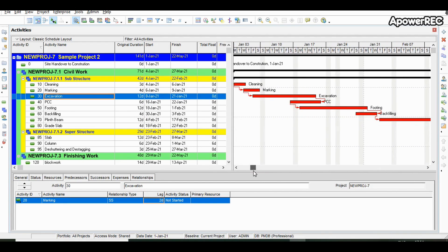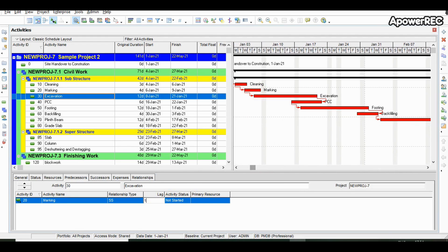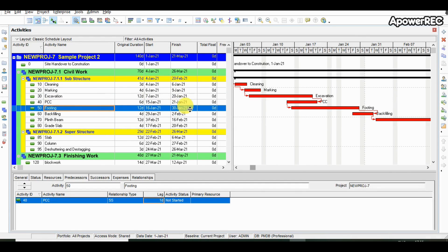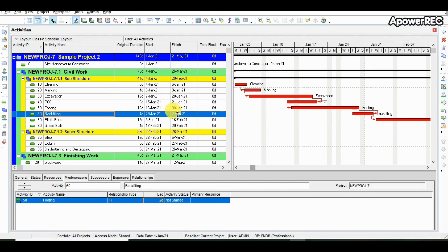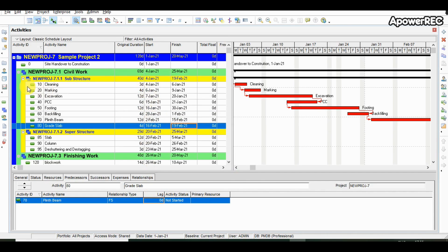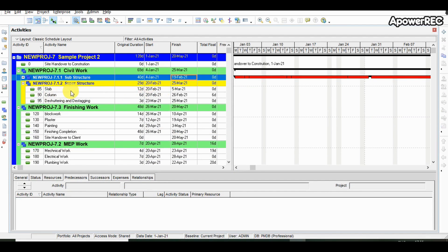Once every stakeholder accepts the schedule, it can be converted into a project document. We make those changes all stakeholders agree on. For footing the logic and schedule is okay. For backfilling, the logic, relationship, and lag are okay; however, we can reduce the lag by 1 day — next day of footing we can complete backfilling — changing from 2-day lag to 1-day lag, which is practically possible for a small project. For plinth beam and grade slab the logic is okay. We can conclude that substructure will take 40 days, agreed by all stakeholders.